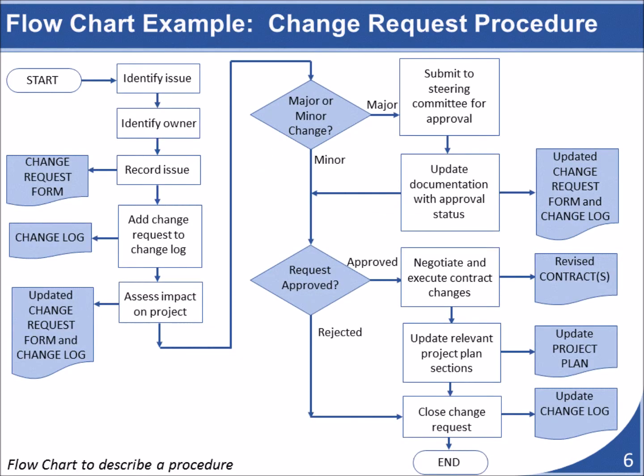This image would be an example of a process that has been created in support of an organization's policy on change management. The organization might have a change management policy that states all changes to project scope must follow a standard controlled process that ensures appropriate analysis, planning, and execution of all change requests.